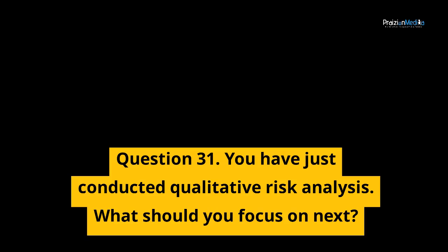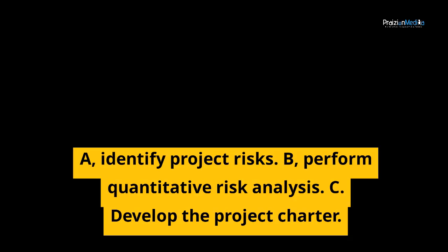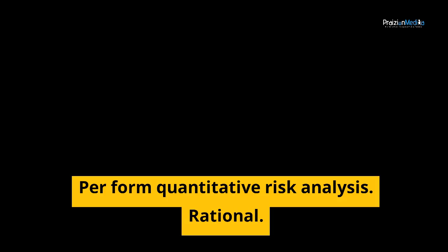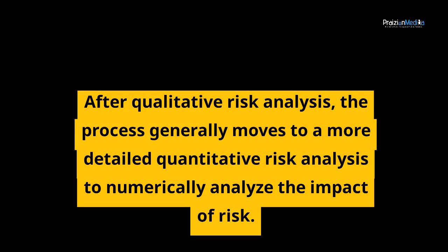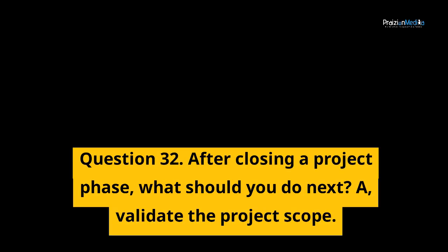Question 31. You have just conducted qualitative risk analysis. What should you focus on next? A. Identify project risks. B. Perform quantitative risk analysis. C. Develop the project charter. Correct answer, B. Perform quantitative risk analysis. Rationale. After qualitative risk analysis, the process generally moves to a more detailed quantitative risk analysis to numerically analyze the impact of risks. Question 32.